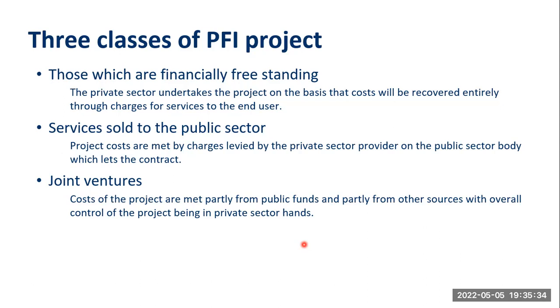Under this circumstance, the project costs are met by charges that are levied by the private sector provider on the public sector body, which lets the contract. So this one is not the individuals who are paying, but the public sector body. Maybe the ministry will pay some money to the private sector, and they will take charge of the whole thing. Like waste management.